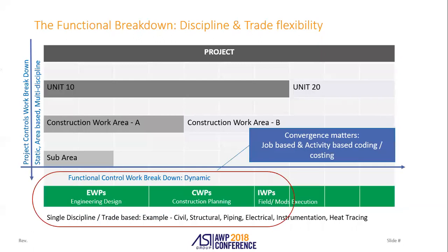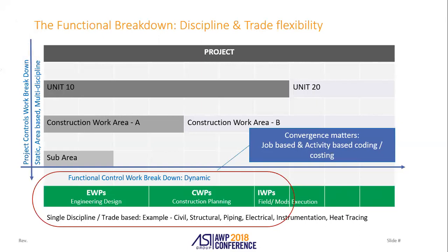A lot of projects look at things done by work breakdown structures — a project in a different unit — but much of that is based on the concept of multiple disciplines. In AWP we really want to make sure it's job-based and single discipline. Everything you think of in AWP is normally by single discipline.